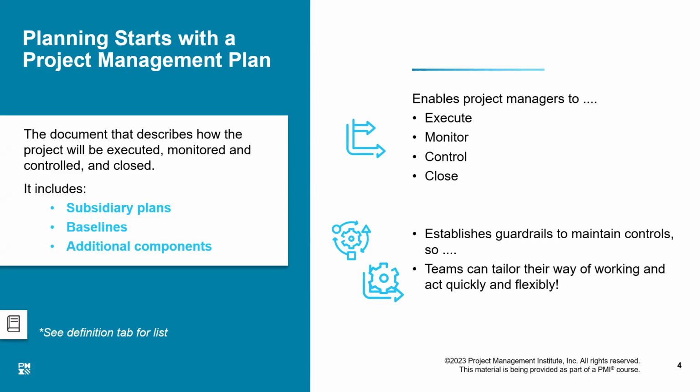If anything changes in any other knowledge area, the ultimate impact is going to come either in scope or time or cost, right? So therefore, we don't need to baseline everything. We just need to baseline these three major project objectives: scope, time, and cost. So what is baseline? Baseline is the final approved version of planning for scope and for time and for cost. Final approved version, which is executable.